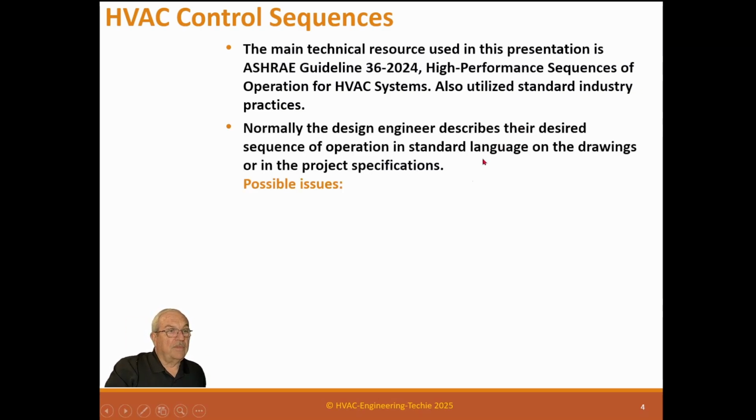Hopefully that'll help. Normally, the design engineer describes their desired sequence of operation in standard language on the drawings or in the project specifications. But there are issues with engineer-designed sequences. New innovative sequences never used before. In today's world, especially in the green building movement, they give you points if you can dream up something no one's ever seen before, thinking that, of course, it would be better and more efficient, but many times those new dreamed-up sequences have holes and problems all over them because they've never been done before.